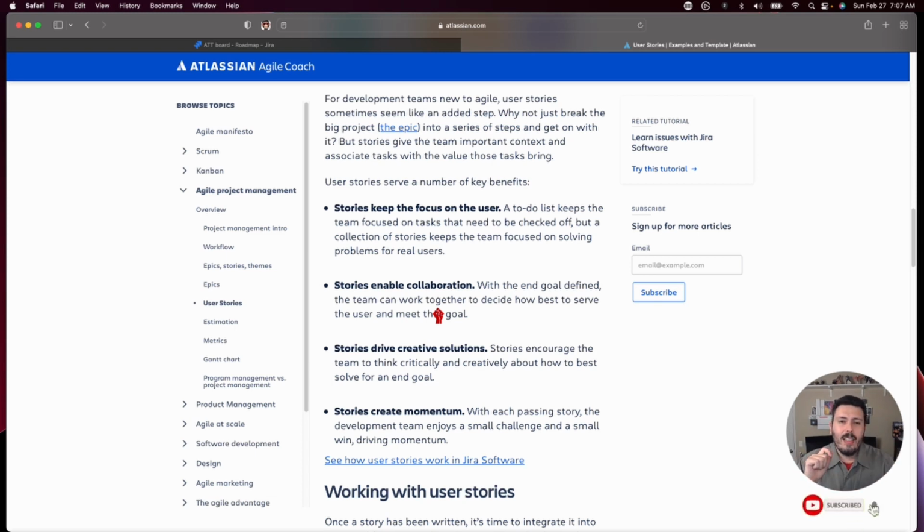I think that in a real world environment, that creates an opportunity for miscommunication. So I usually give the teams two pieces of advice. Either A, make more stories so you have the right story. You're splitting the story into a different team and their area of specialization. Or B, create some subtasks so that every individual that is going to be responsible for delivering something is going to have something that they can be held accountable for.